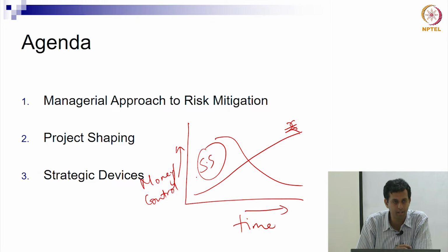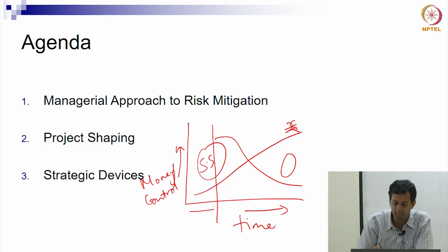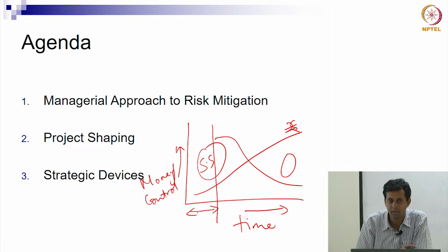You've spent very little money, and you actually haven't made finalized decisions yet. Here's when you can make decisions to engage stakeholders. There's no point engaging stakeholders somewhere later, when your project's already built and you can't really go back. If stakeholders want a 180-degree turn, it doesn't really happen. This happens right here at the beginning of the project, so this is the important phase that we want to really focus on. It's called the project shaping phase.